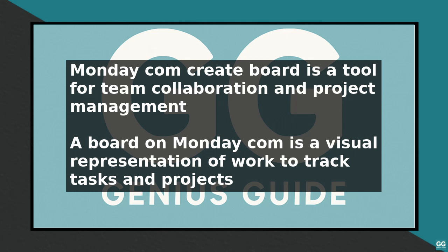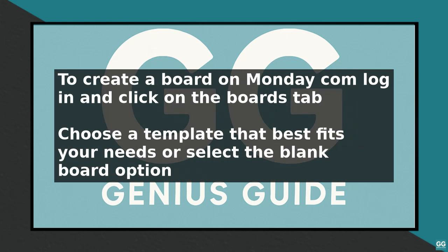To create a board on Monday.com, log into your account and click on the Boards tab. Then, click on the Create Board button. You will be prompted to choose a template or start from scratch. Monday.com offers a variety of templates for different use cases, such as project management, marketing, and sales. Choose a template that best fits your needs, or select the blank board option to start from scratch.